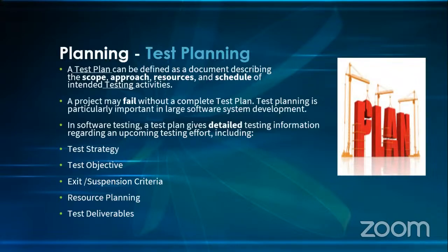We had a blocker. There were some showstoppers. We weren't able to access the environment. Hence, we have to move it, because for day one, we didn't do anything. On day two, half of the day was still spent fixing the environment. So we've just got half a day. So it's moved to another 2 days for us to be able to test.